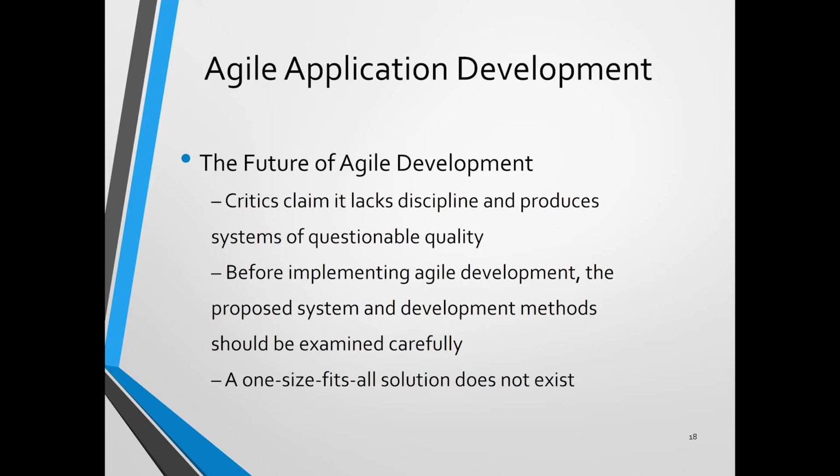The programmers and system analysts are available for discussion, but if the users are not available, there is no one to give us feedback: is it okay or not for this module? So the agile method might not work, and we may have to go back to the traditional way instead.